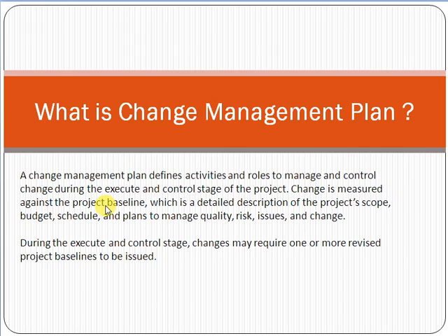What is a project baseline? Try to understand that if you are starting a project and you have to deliver 5 modules to a customer, let's assume, and you have to deliver them in 5 months with a $5,000 budget. When you start a project, you make a baseline. This is your baseline with respect to scope, cost, and time. Baseline means 5 modules delivered with $5,000 cost, within 5 months. So this is your baseline when you are starting a project.